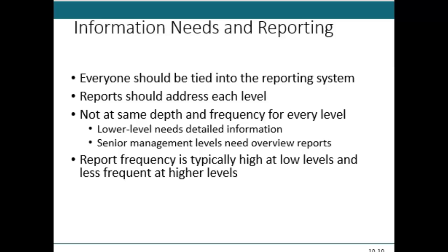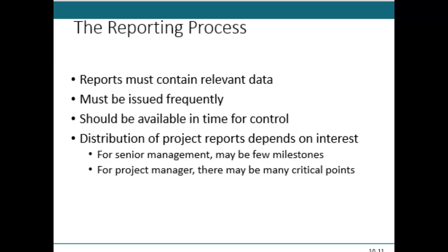Where higher level might have a need for a broader view and milestone related approaches to risk reporting or to reports, period. So in either case, the structure of the report should reflect the work breakdown structure, and each managerial level receiving reports should be allowed the exercise of control over that relevant data, right? There's a tie between the reports and your ability to control the data.